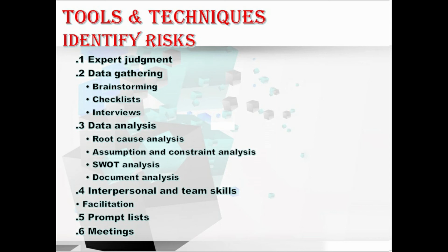In these meetings, to undertake the risk identification, the project team may conduct a specialized kind of meetings, often called risk workshops. Most risk workshops include some form of brainstorming, though other risk identification techniques may be included here also, depending on the level of the risk process defined in the risk management plan. Hope you understood about these meetings.